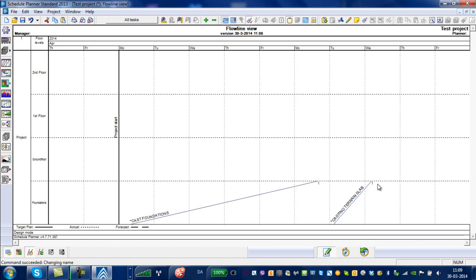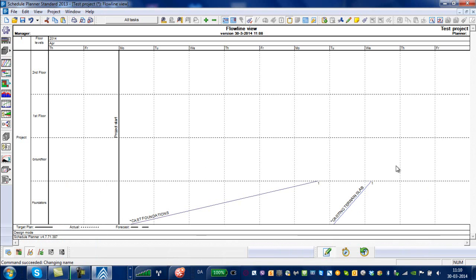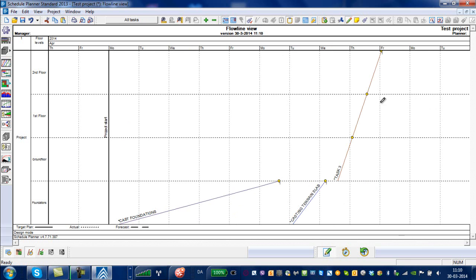And then I'm going to go in and do the rest of it, because from the ground floor, when the slabs are cast, the next step would be to cast or to establish some wall elements, and this could be concrete prefabricated wall elements that happen on the first floor, the second floor, and the third floor as a continuous process. So to do that, I just go in and draw up a line that goes within the three different levels there, and click there.